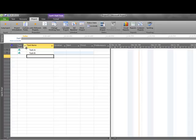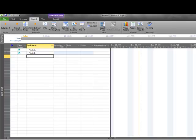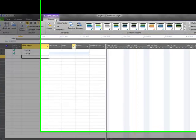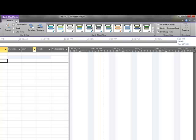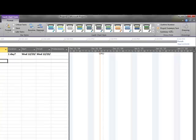So, since I don't have a tools options menu to go ahead and pick that anymore, that is now under Gantt chart tools. You can see that this is highlighted right now because I happen to be in a Gantt chart view down below. So, if I click on the format tab, you'll see some great new features. One of those is to turn on the project summary task.